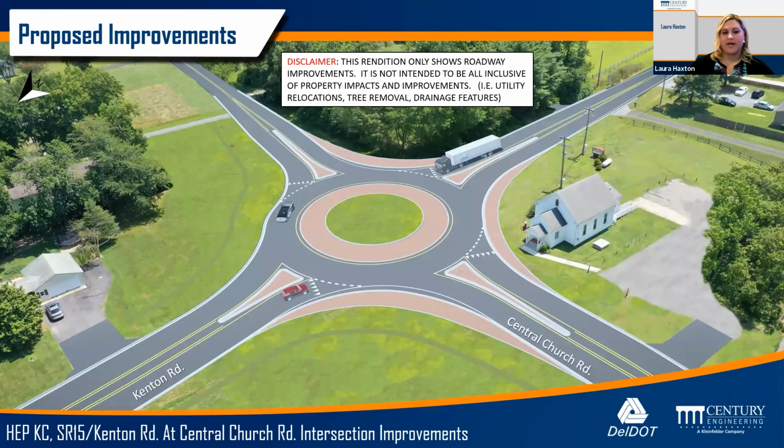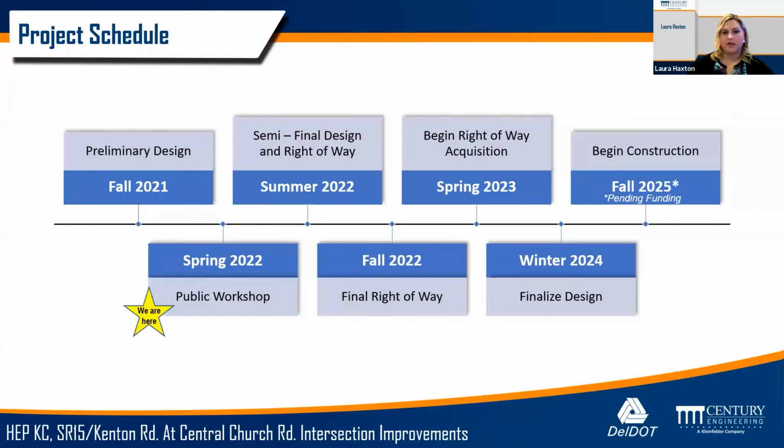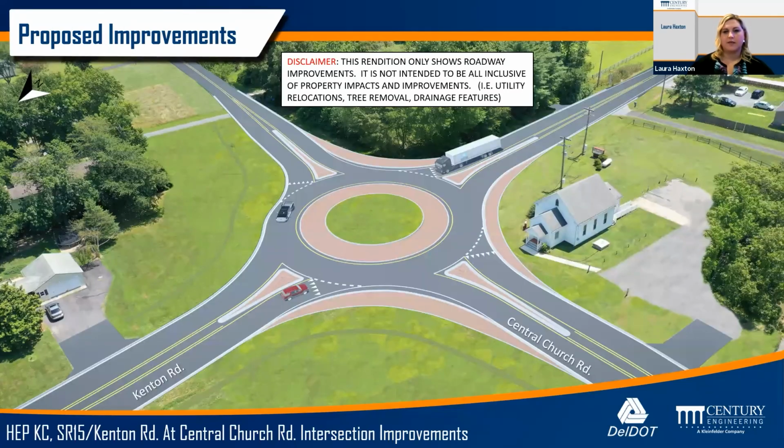Right now, we have construction starting in fall of 2025, and it should take approximately 3 months to complete. And like I said, we are still determining the extent of relocations for the utility companies, so that will also have to be put into that timeframe as well.